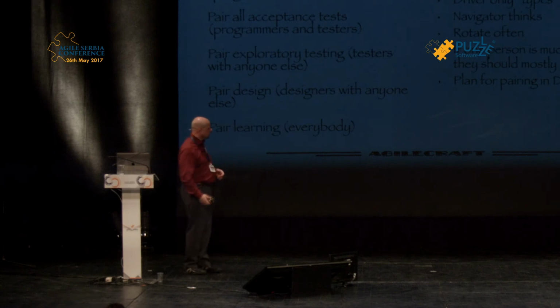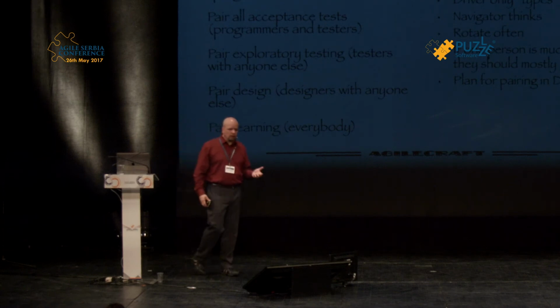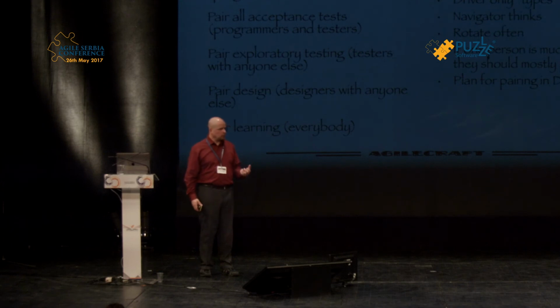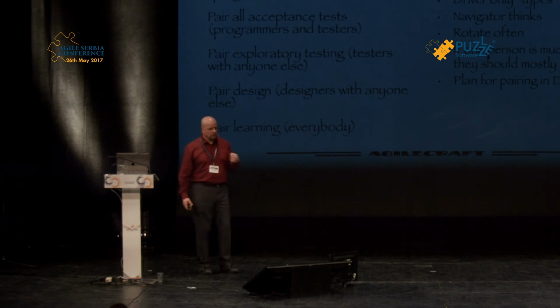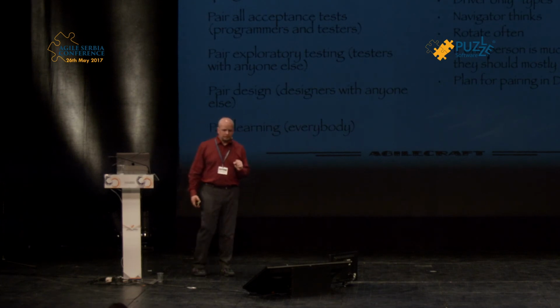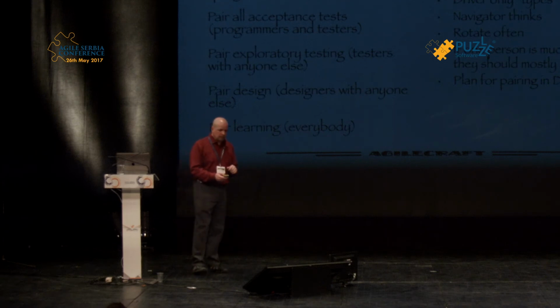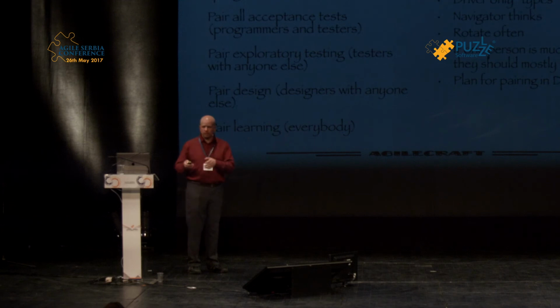And plan for pairing in the daily Scrum. I do recommend that you put pairing as a standard component, that you don't do anything, at least not production code, without pairing as a foundation. But you shouldn't do design without pairing either. So you should have it as a standard practice. Whatever we do, it's always a pair. There's always 2 names on every single task. At least if you do that, then you are creating an environment where swarming happens all the time.